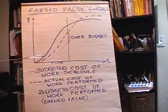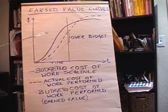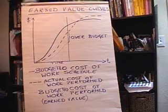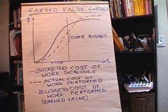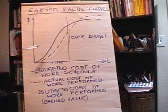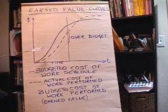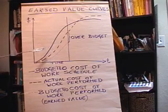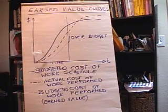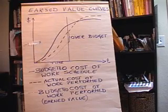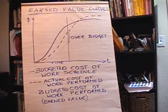Most project managers, especially ones working for the Department of Defense who manage many projects, can look at these three curves and without even thinking very much about it, determine whether they're over budget or under budget, or ahead or behind. So if you're tracking a project in Microsoft Project, these earned value curves will pop up, assuming that you're keeping your project updated on progress, how much you've actually spent, and how much you've budgeted in the project itself.